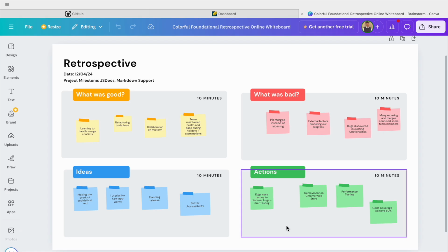The second process that we followed was rotating meeting leads and note keepers. For every meeting, we had a new meeting lead and a note keeper. And we also asked every member of the team to submit a small write-up on what they would like to address in the meeting about 1 hour before the meeting. This acted as a checking function that everybody did prepare for the meeting. Not just that, rotating meeting leads also ensured that accountability and responsibility was shared among all team members and not just the team leads.